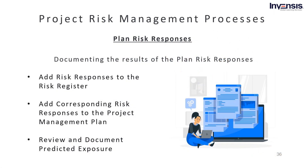Let us talk about documenting the results of the plan risk responses process. Risk response planning is based on the information placed in the risk register. You can add risk responses to the risk register — the response-related information for each risk is recorded and updated regularly. Any stakeholder should be able to access any of the information to manage their responsibilities and risks under the risk response plan. Also, the set of residual risks and their priorities are identified and recorded. You can also add corresponding risk responses to the project management plan.